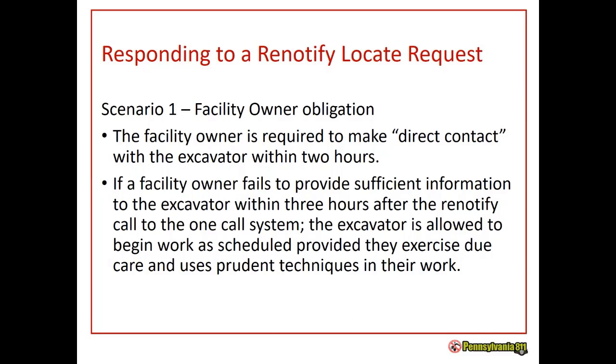If it so happens that the facility owner does not provide that information, there's then an extra grace hour built in, and after the 3rd hour, the excavator is allowed to begin work as scheduled, provided they exercise due care and use prudent techniques in their work. In this particular case, we may understand that the facility owner has not provided all the information that they were required to provide. However, you, the excavator, have told us you know something is there. Be careful about it, regardless of who's to blame for whatever markings or mismarkings. It is still going to ruin your day if you hit that line. Please do not hit facilities that you know are down there.